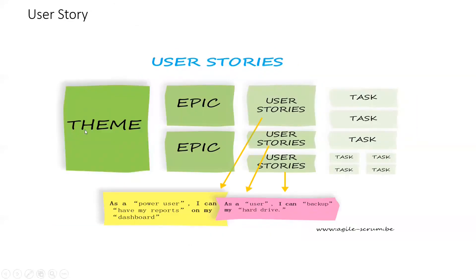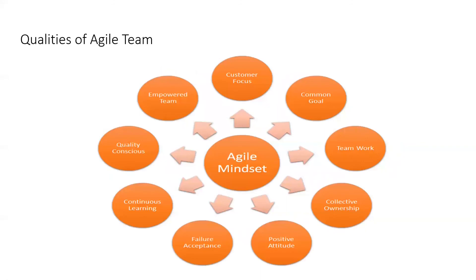The theme — for example, an ATM machine — is divided into user stories: one for deposit and one for withdrawal. Deposit could cover check or cash deposit; withdrawal could cover dispensing money or getting statements. User stories can be defined as 'I want reports on my dashboard,' and so on. User stories are divided into sprints, where more than one user story can be part of a sprint — a small part of the project completed in two to four weeks. Two or three user stories together make one release, which is a minimum marketable feature.